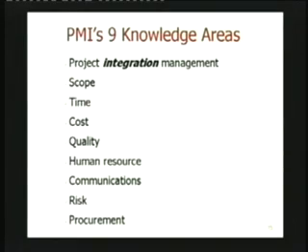Now just to go through the list, scope, you understand what it means. Scope means what things I'll be doing, what things I'll not be doing. Time, of course, the time at which I can commit to do the thing. Cost will lead to my budget. Quality is requirements. Human resource, the different types of skills I require and when I require them, that plan has to be there. Communications, all the reporting things and everything else, all the little meetings you'll be holding, those things would be there.